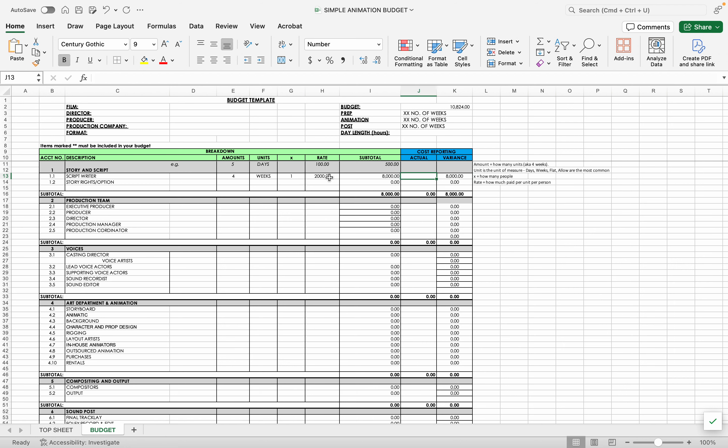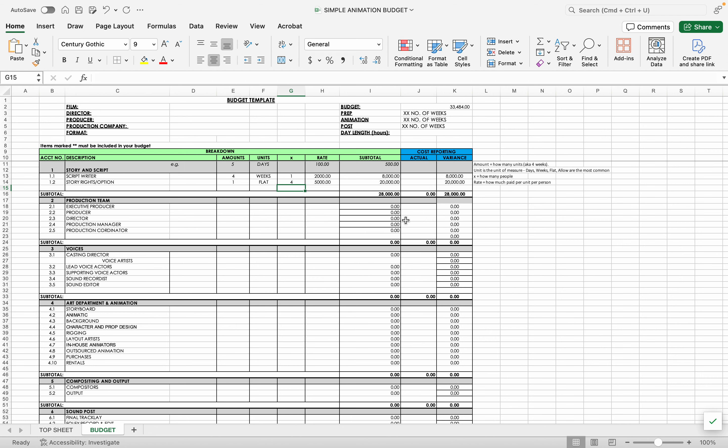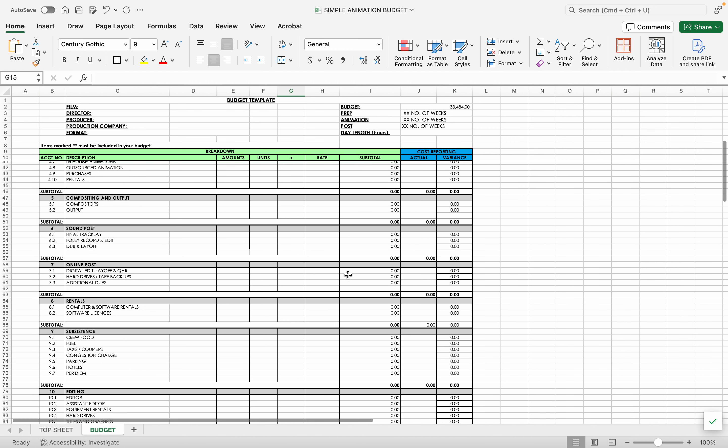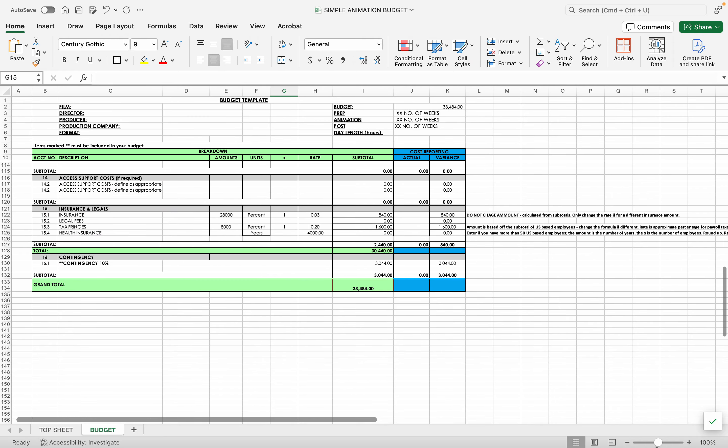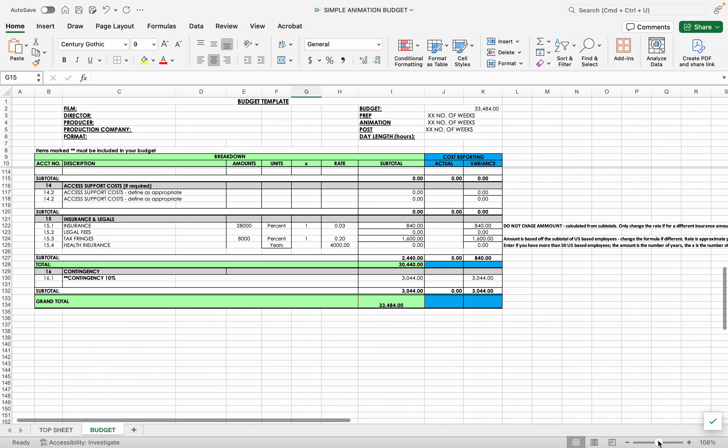So you go through, you put these things. Let me throw here in the story rights. Let's say you did a flat option for two writers who would come up with the original concept, or maybe it's your team. So there are four people on your team and everybody is going to get $5,000 for all the great work they did developing this story. All right. Now that is a flat fee payment. You don't pay employment taxes on this. So let me skip down here to show you guys the calculations that I put into this spreadsheet for you. And this is the stuff that was different from the source I found.